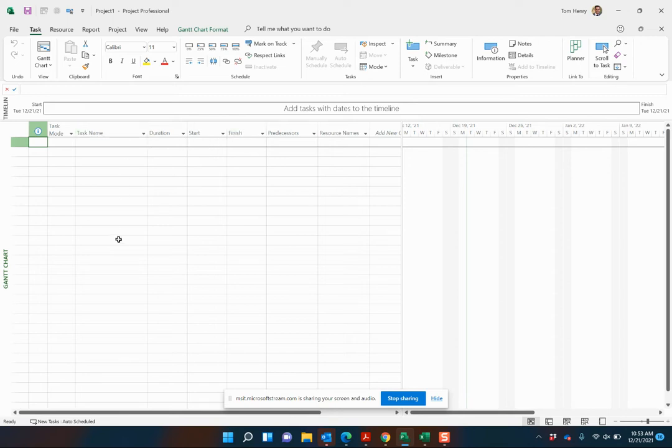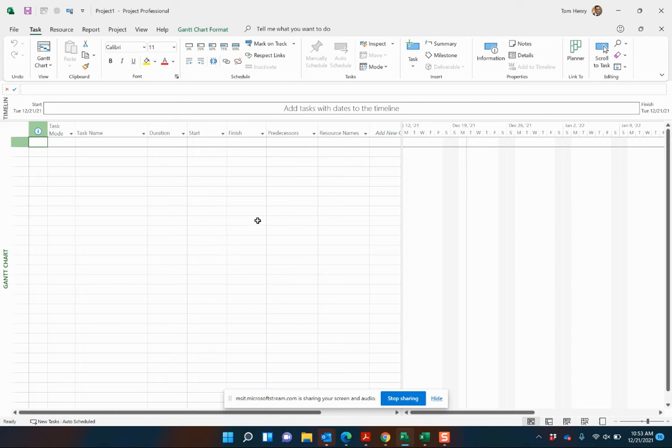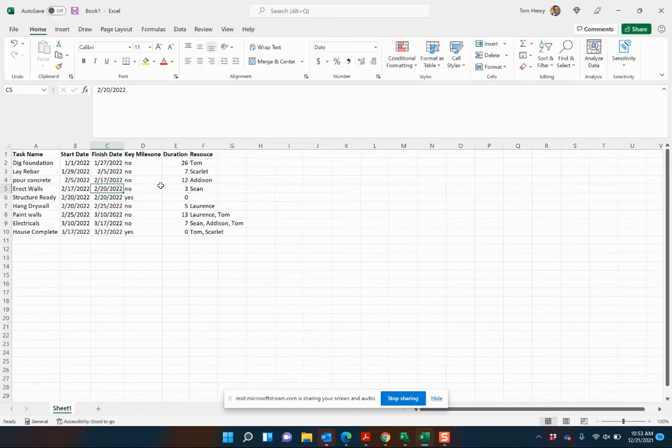We're going to put in the names of the tasks. We're going to put in the predecessors and then Microsoft Project will calculate the start and finish dates for us. That's one of the values of the scheduling engine. So let's go ahead and get started.